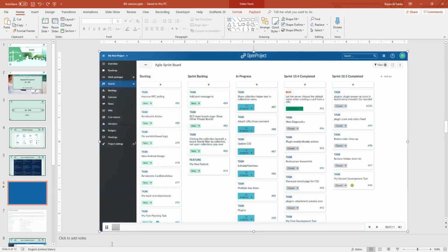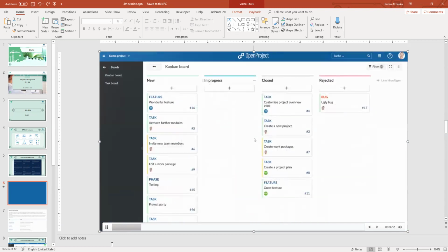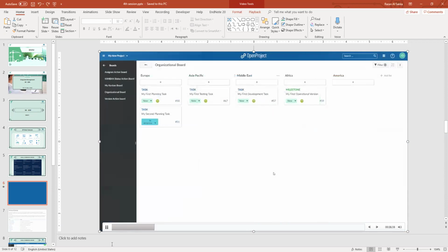Boards in OpenProject support Agile project management such as Scrum and Kanban to collaborate, communicate, and coordinate on all your projects and get things done. Boards help to visualize work, limit work in progress, and maximize efficiency. You can create as many flexible boards as you want. Boards consist of lists with cards on it. Cards display the work packages in a project. The lists usually represent a workflow, like the status or the version of a work package, or any other criteria, such as the assignee. You can differentiate between two kinds of boards.